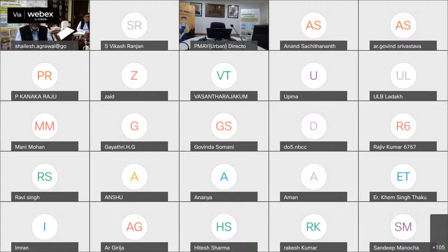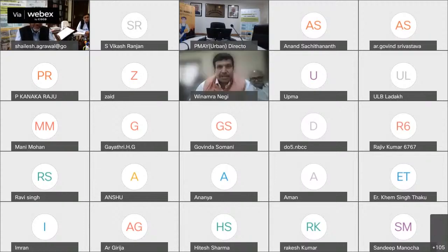Okay. So thank you. Scale of project, I think, for adoption of this monolithic construction, sir. I think he has said that 100 to 150 repetitions means almost you are evening out. 200 to 300 for steel, yes, even 500 companies are claiming. Jignashu, you tell him. Yes, sir, you can use 1,000 repetitions. 1,000, just to give you an idea. Yeah, it's steel.